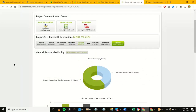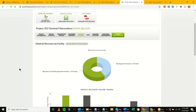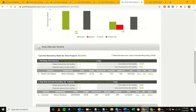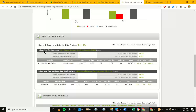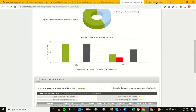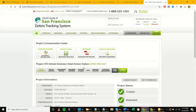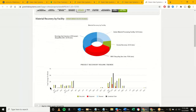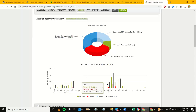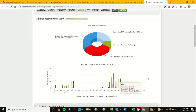The next thing is Facilities and Tickets — this is really where your final compliance verification occurs. All the weight tickets the contractor uploaded exist here, listed by facility. If there are 20 tickets for Recology, you see those in that table; if there are 100 for Bay Area Concrete Recycling, they're in that table. The project recovery volume trends chart will look much nicer for real projects — most projects trend like a whale shape, with heavy demolition at the beginning and then a large final dump run at the end.